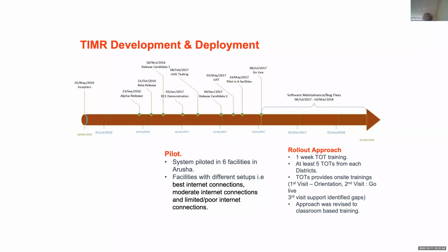And during the rollout process, we conducted TOT training to ensure that we have the team or resource in place that can train the healthcare workers at the facilities. And then after we went live, we also had the time to keep supporting in case we found any bugs or issues, and then they are addressed by the developers. Next slide, please.